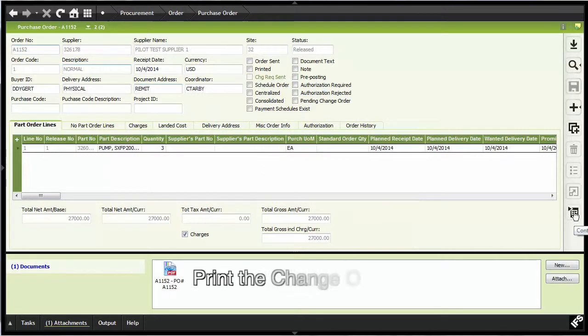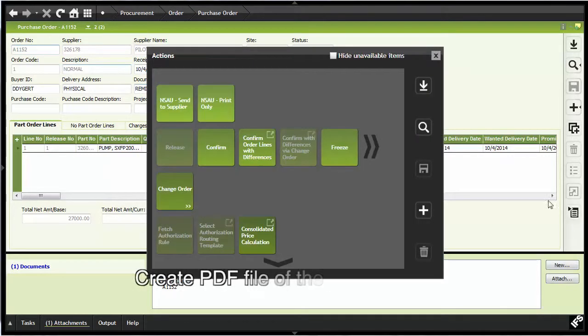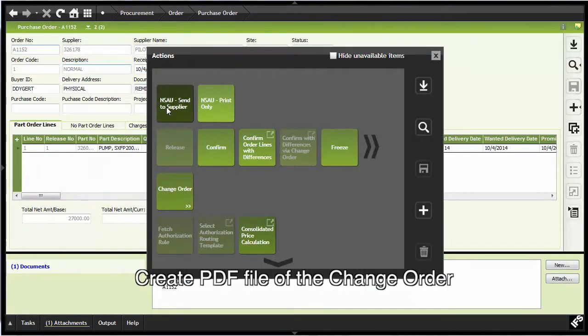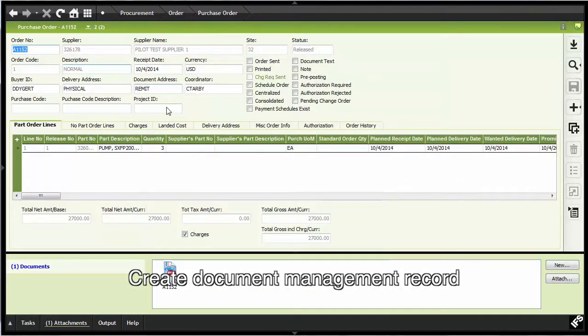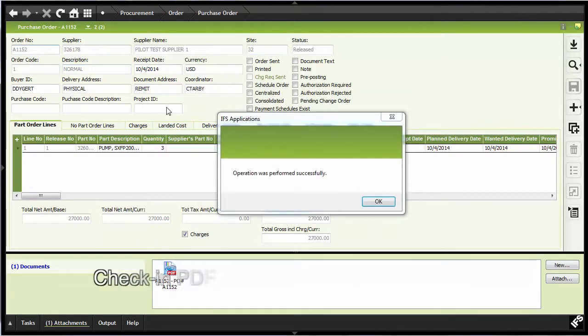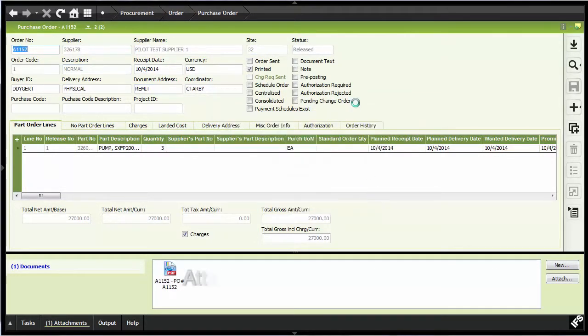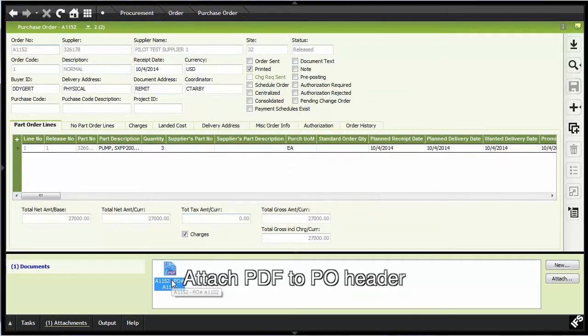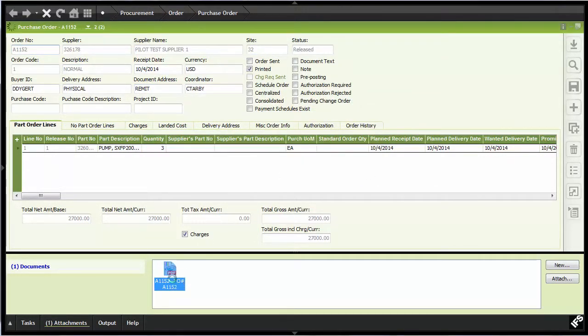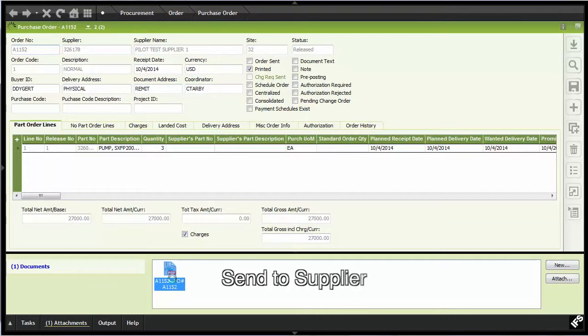the automated process creates the change order report as a PDF file, checks it into document management, establishes the object connection to the PO header, and then electronically sends it to the supplier.